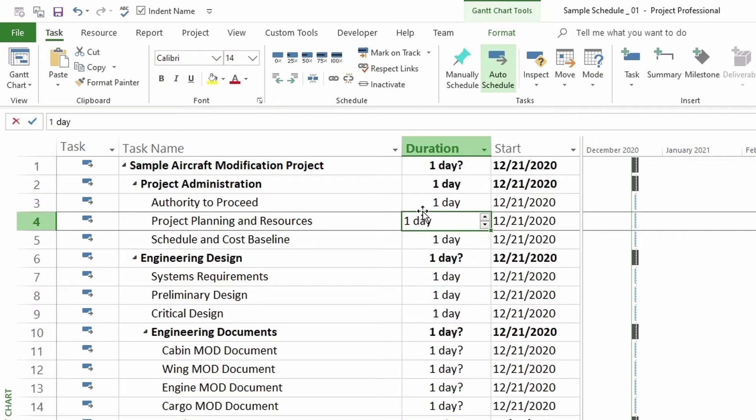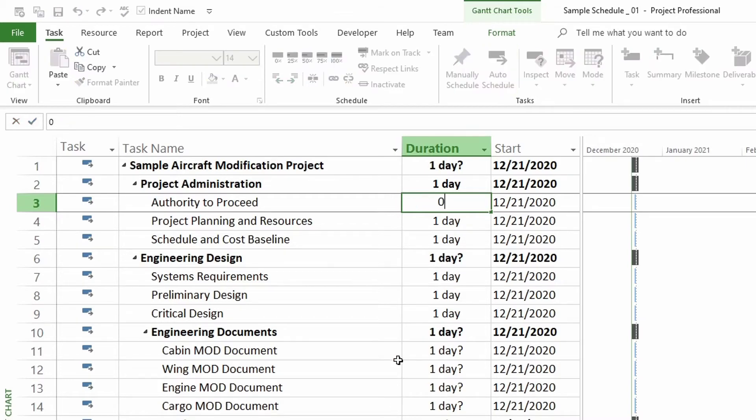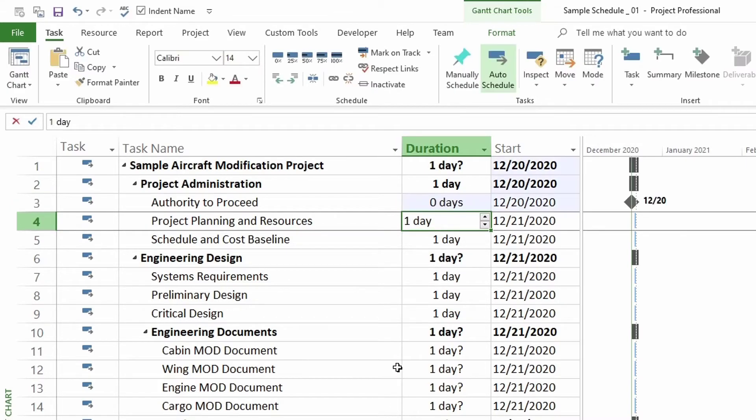So here for authority to proceed, I'm going to add a zero to make it a milestone. So I'm going to add zero right here. And now it's a milestone. So that's it.